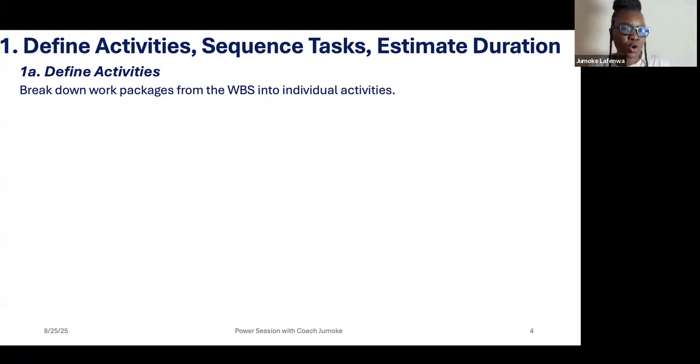You have to mix the concrete. You would have to pour the concrete. You have to put rods. So these are the activities of the work package concrete foundation. After you have listed all the activities in all the work packages, you have them defined. That is how you break it down.